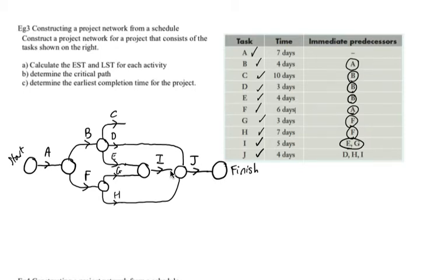and then we close up any loose ends we have. We just put the J into there. We knew J, once that's done, it's finished. But there's a sneaky C over here as well. We have to tie off all loose arcs. So try to tie that in. So now we've got all our tasks. You might want to neaten it up, or if you think it's too messy, redo it. And I've just connected up C.